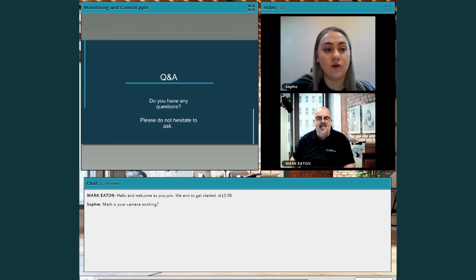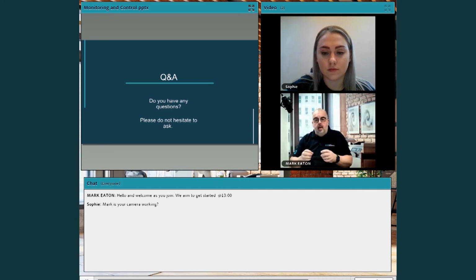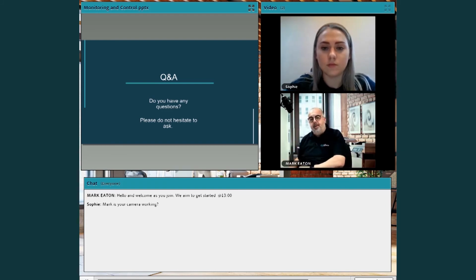So the next one we've got is, how does a business case relate to the plan? Once again, they complement each other. A business case is used to justify the investment. It sets out some important things that will affect the plan, for example how much the sponsor's willing to spend, whether there's a hard deadline or not, and what the key risks to the project are. That informs the plan. But once you've completed the plan, it then informs the business case and confirms that you can actually deliver what you're supposed to deliver based on the information within the business case. So the two are complementary. They should be seen as living documents, kept up to date all the way through the project, not just created, put into a drawer and forgotten about.